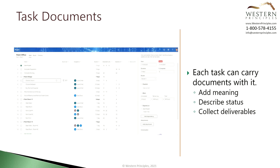Each task can also have attachments or documents attached to it. Like notes, these documents can be used for adding additional information to the task and describing progress. You can also use attachments to collect the task's deliverables. To add a document, bring up the information panel and scroll down to find the Add Attachment button. From here, you can add documents from your PC or from SharePoint, and you can also add website or intranet URLs. When you've added the document, it shows up on the information panel and also as a paper clip in the Quick Look column.